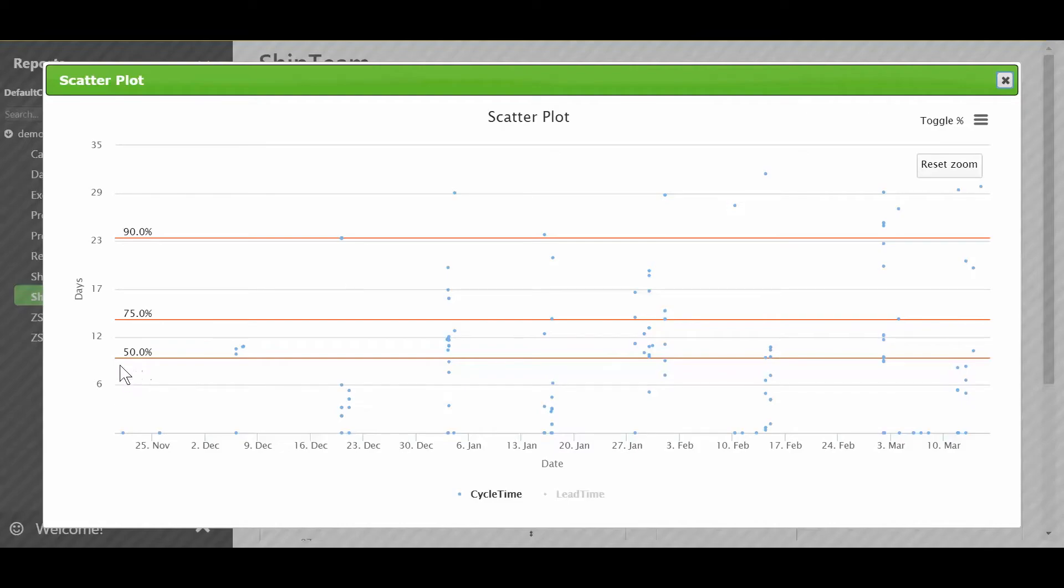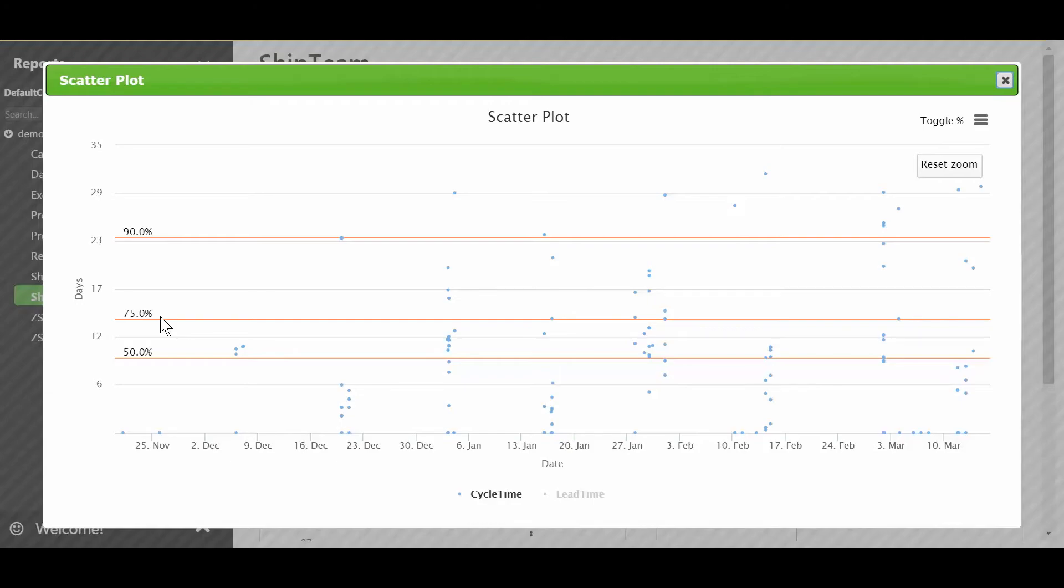But there's a lot of work that's completed after 14 days. Now most of it's done, 75%, is done in 14 days or less. Since their sprint length is two weeks, we expect that. Notice how many items, however, are sliding beyond the sprint.